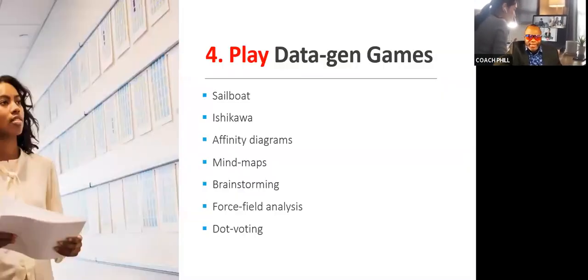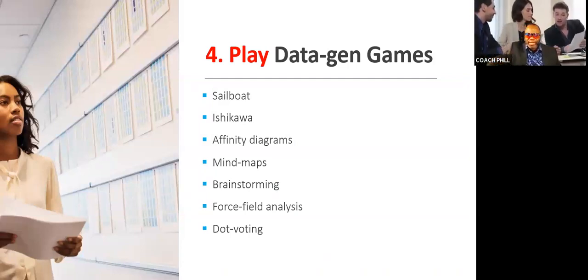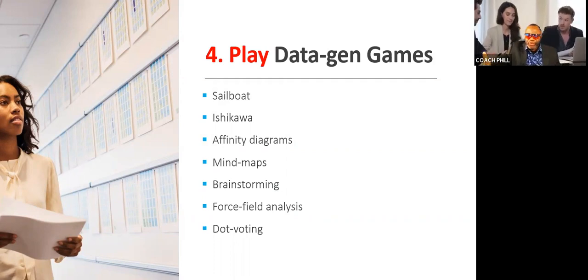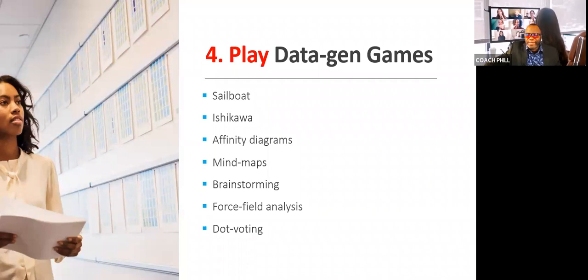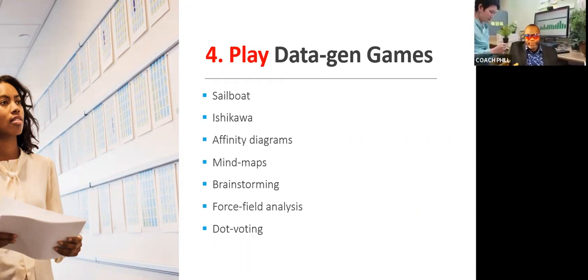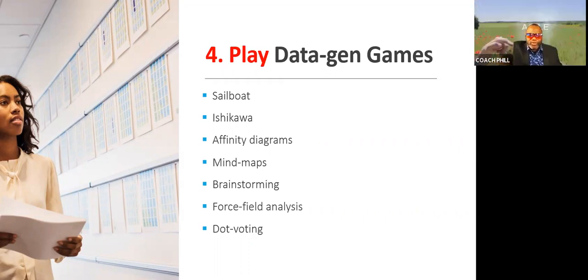So I like these data generating games. Even if you're using an Ishikawa, make it fun. Make the dialogue fun and lively. You could use affinity diagrams, great for brainstorming ideas and then grouping those ideas. Mind maps, great for showing commonality between ideas. Force field analysis, showing forces for and forces against to make a compelling reasoning behind why you should do something. Dot voting, where you can spend those dots on whatever you want to vote on. All of these could be used in different ways.